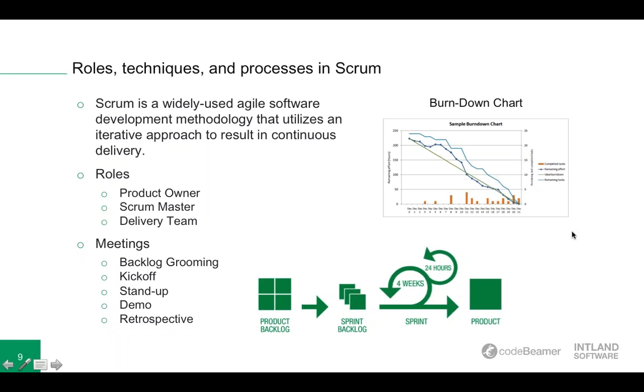On the last day of the sprint, the developers demo the product to the product owner and the rest of the team. And finally, at the end of each sprint, after the demo, is the retrospective meeting, where the team talks about what went well and what challenges they faced, why they could or couldn't complete all the stories in that sprint, and what they can focus on in the next one, or what they need to focus on.